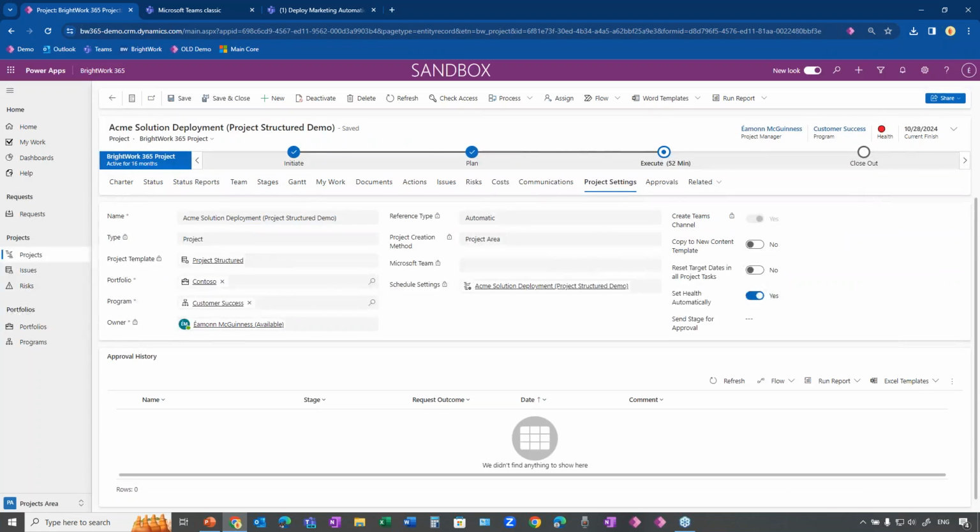And not everybody requires it. It's available in all templates, but you may only use it on some. That's your choice. So really what you've got there is this notion of much more flexible calendar schedules. Your work week could start on a Tuesday. You could work a 3-day week from a project management point of view, with the other days saved for other work. You can have common holidays and non-working days, or not, as you so wish.